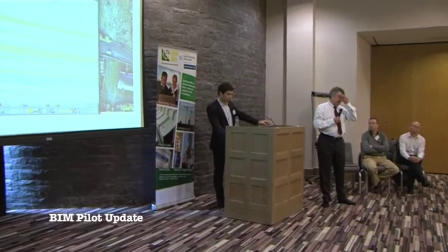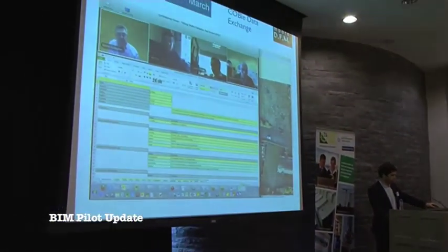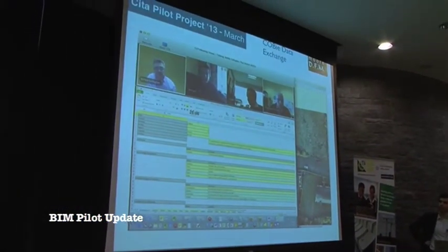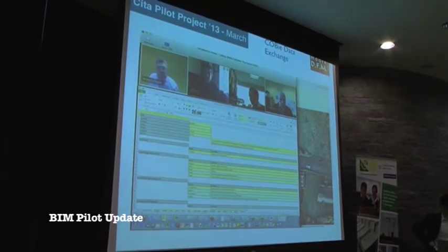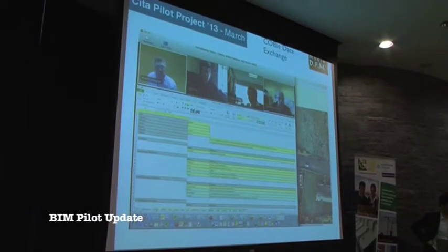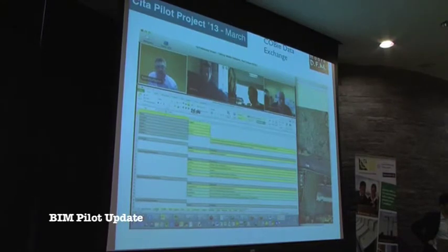One of the things, again, in terms of trying to collaborate and see what issues were there, we've set up a weekly site meeting, if you like, a virtual site meeting, using a web conferencing system called GoToMeeting, and that's proving pretty useful at the moment. The meeting's on every Tuesday at 1 o'clock, regardless of whether people attend or not. People can plug in at any stage. We're able to exchange information in terms of screenshots and everything else.